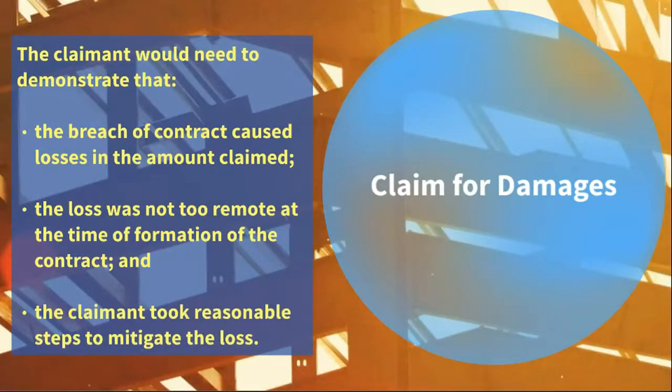Legal causation is different from factual causation, which raises the question of whether the damage resulted from the breach of contract or duty. Accordingly, once the factual causation is established, it is necessary to ask whether the law is prepared to attribute the damage to the particular breach, notwithstanding the factual connection. Damage which is too remote is not recoverable, even if there is a factual link between the breach of contract or the duty and the loss.